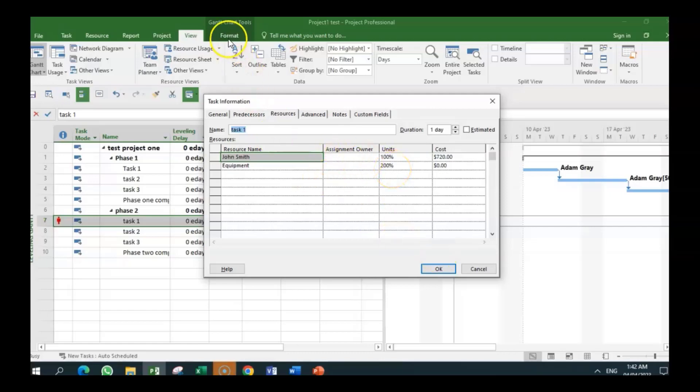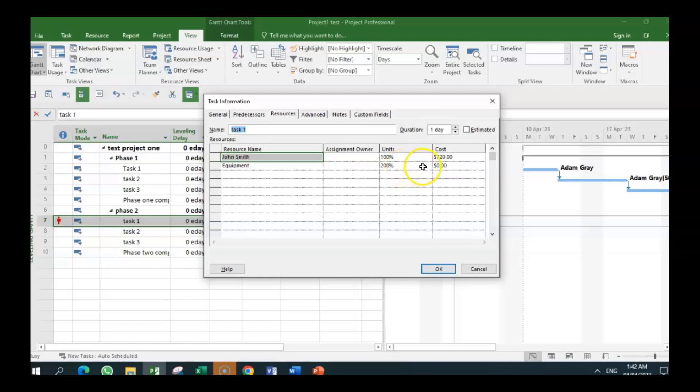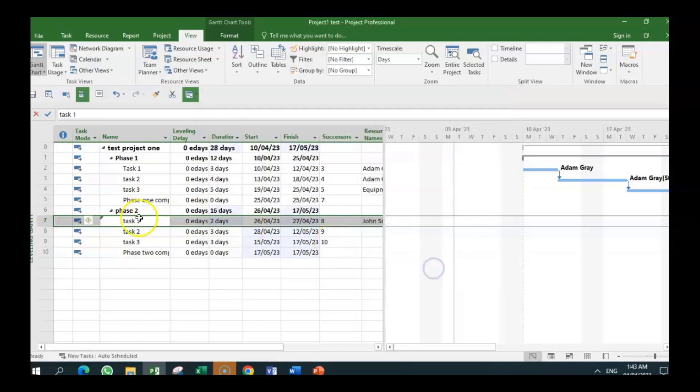So what we can do is ask: is another piece of equipment available, in which case we would add another piece of equipment to the resource sheet. Or we would recognize that we do not have two pieces of equipment. So we bring this down to one. If we do that, you realize the over-allocation has gone.